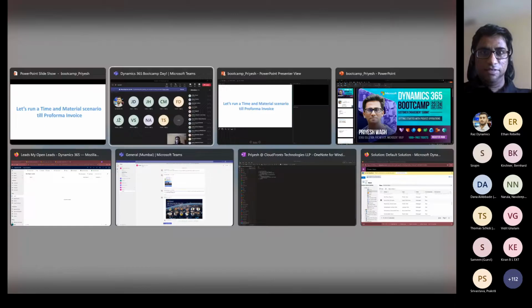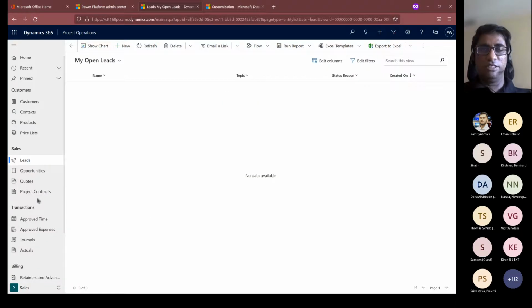So if anyone is new in the project operations or project service automation, PSA or project operations product, there are two types of projects you can run. Let's say you're a professional services organization and you run two types of projects. So one is a fixed bid, meaning the cost of your project is fixed, and every billing frequency you're going to bill the customer for a fixed amount of invoice. And time and material, it's an industry standard term where you know that whatever time your resources have put in on the project, those will be billed.